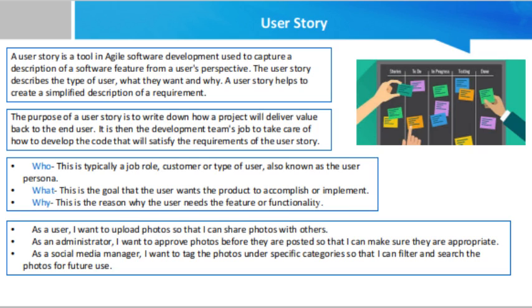Estimable — if you can't estimate a story, it means you don't yet understand the scope well enough, or the scope is too big to estimate easily. You don't need exact estimates, but when you can estimate a story it's also more negotiable, and you'll be able to differentiate between valuable low-effort and not-so-valuable high-effort stories. Small — you want the effort to implement a user story to be small, at most a few weeks by one person, though many teams use a few days as their limit. Smaller stories are easier to estimate; bigger stories are harder to estimate and thus less negotiable.